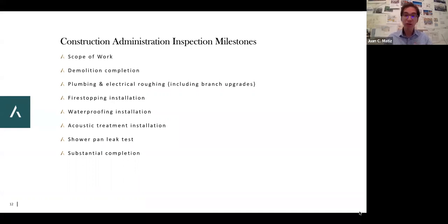So all of that work gets done. There's really no inspection until the very, very end. And at the very end, the plumbing inspection happens, the second version, which is now all the fixtures are in place. Everything should be working. You should be able to flip your faucet and get your hot water, and you should be able to flush your toilet bowl. And the inspection at the end is just to make sure that you didn't put more things than you needed to, or put them in properly, and that they're all in the right places.